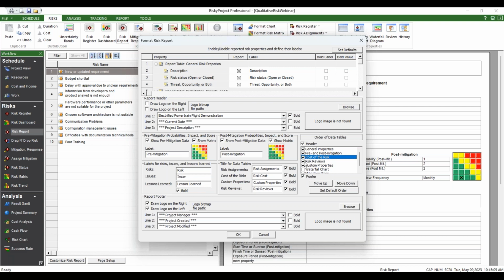There's that cost of risk calculation. So if you're using that, with the cost of the risk curve times probability, you get your expected value, and if you're doing some mitigations around that, or you have a response plan, you can add all of the costs of those to bring out what the expected cost of that risk will be overall, with mitigations, risk reviews, custom process.